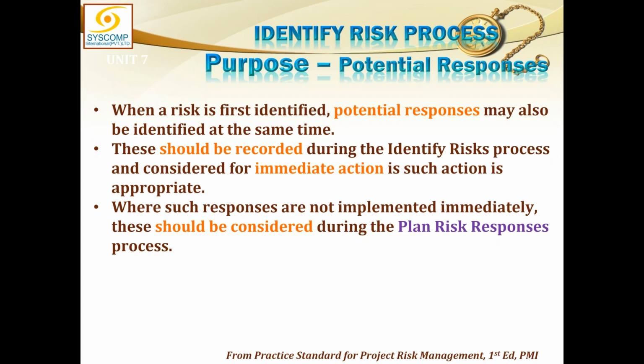Why are we talking about the potential responses? Sometimes the risk identified is an emergent risk, and we do not have enough time to translate it into actions. I have very little time and this risk is about to happen in a day or two, and my risk analysis process may take a couple of days. Then I would rather go for the potential response which has been given to us. I will quickly analyze that response, and if it is applicable, I should immediately take action accordingly. These should be recorded during the identify risk process and considered for immediate action, if such action is appropriate, that is for the emergent risks.